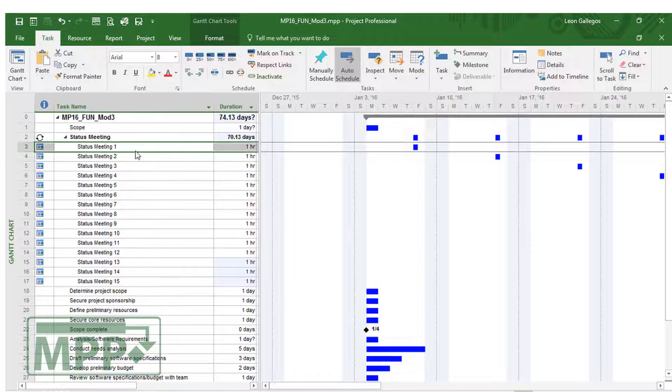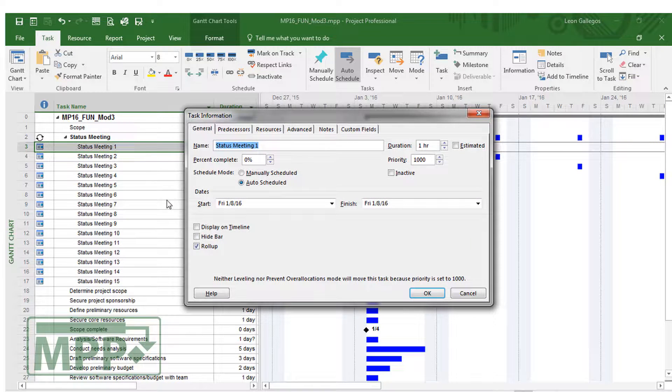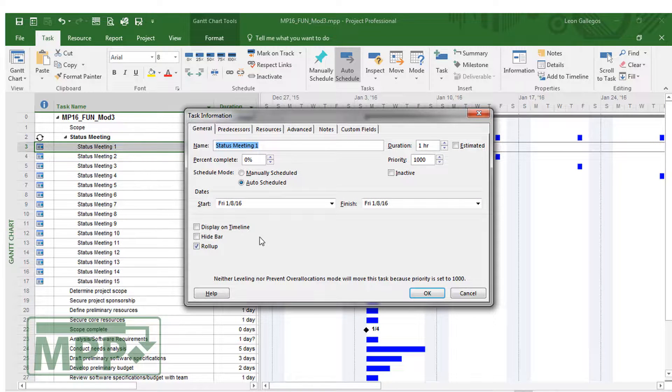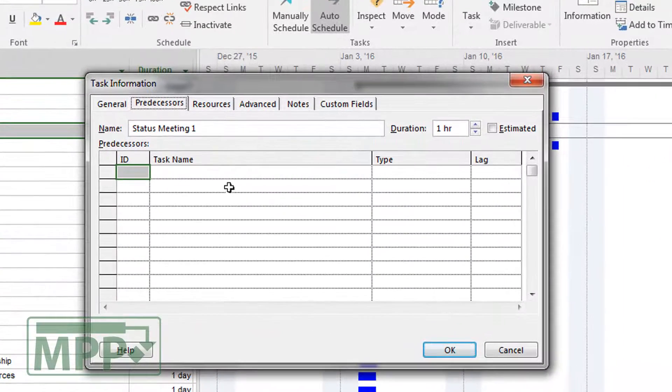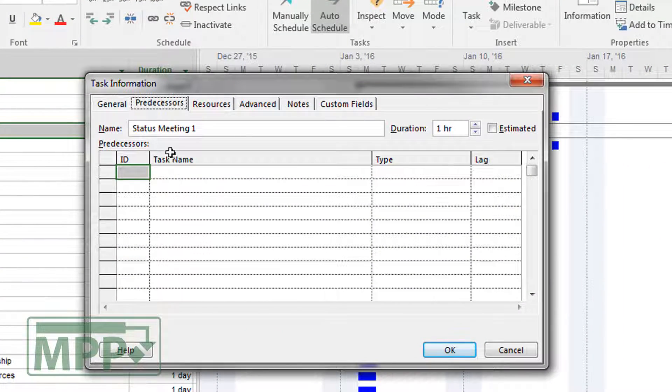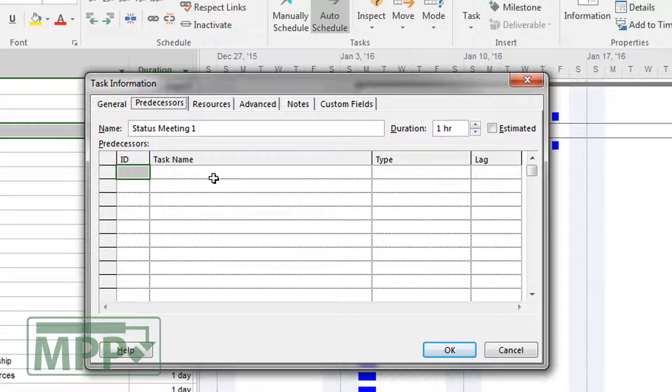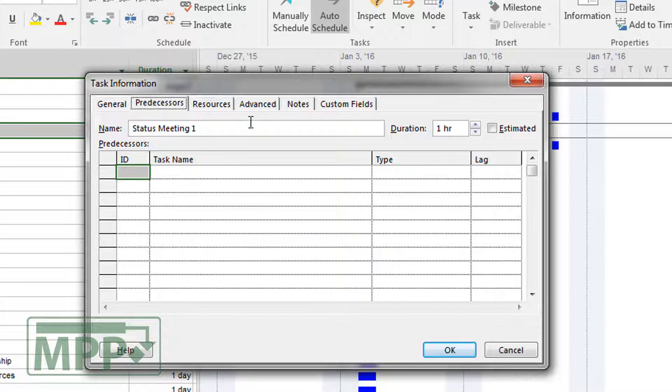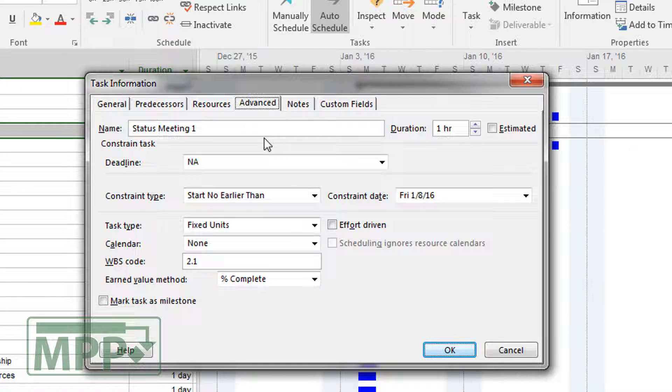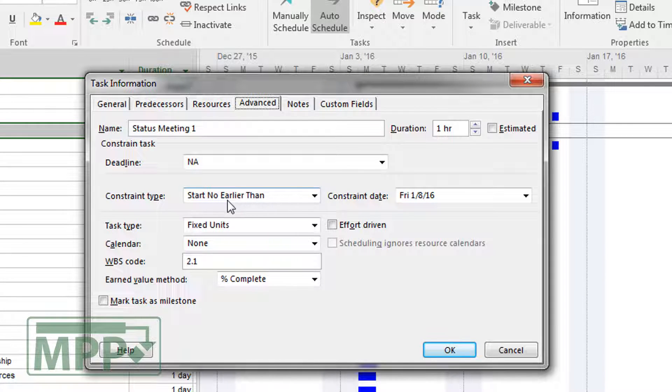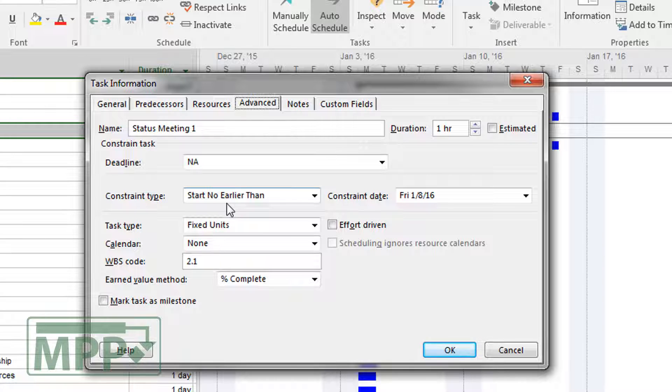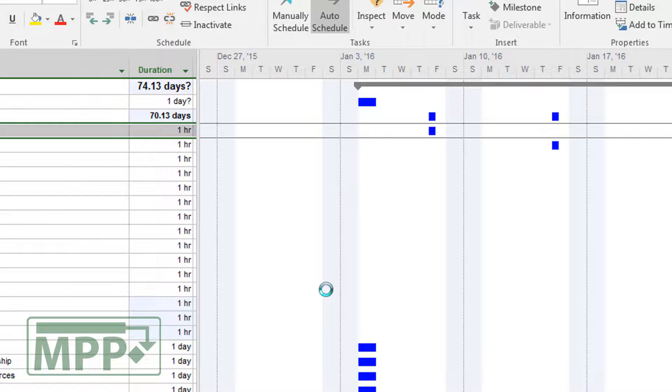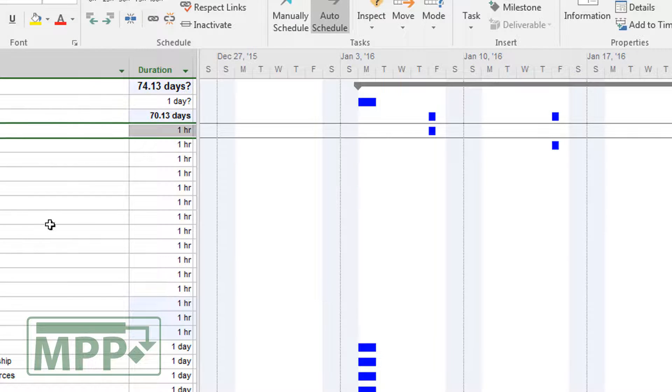Again, these can be edited. If I go into this status meeting, it's a task, so it's treated the same way. Task information. In this case, notice that these do not have predecessors in them, but they do have a constraint. We'll talk more about constraints as we work through this course. But these are falling on a particular date. Start no earlier than constraint is being applied to these individual meetings. But we'll learn a little bit more about that later on.